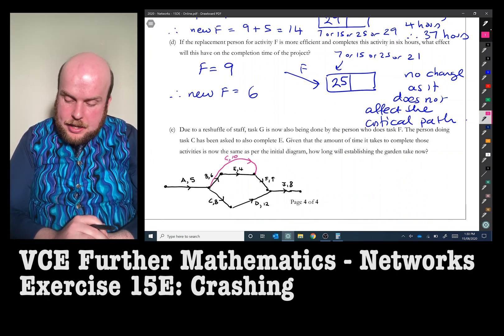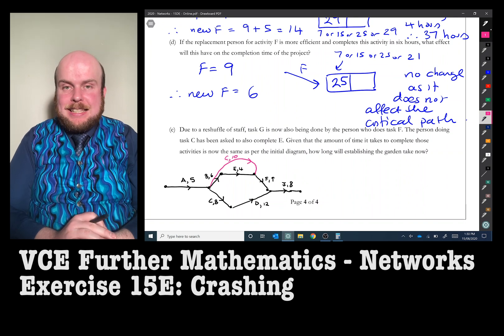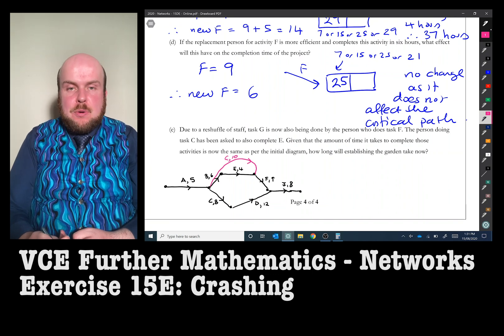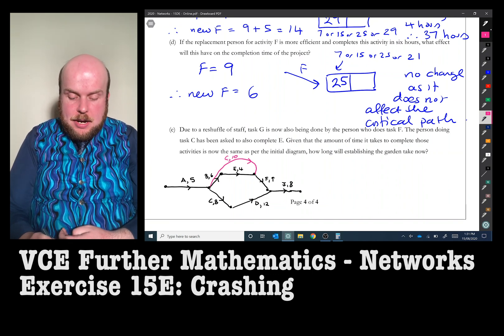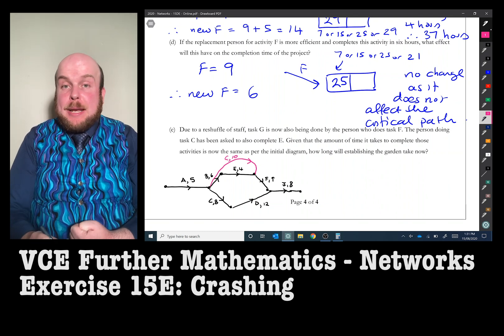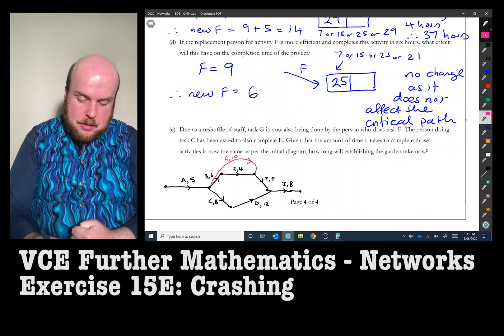It also says there that the person doing task C has been asked to also complete task E. So in other words, the predecessor to E has to also be C. Now, you might notice there that if I bend C up to attach to E, I will now get a parallel edge, which we can't have. So what we're going to do is put a dummy in here.